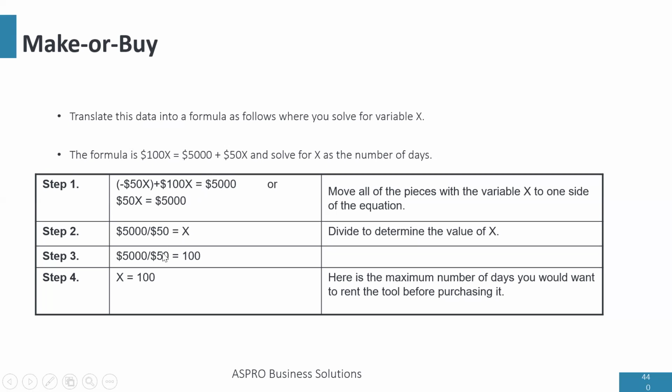So what do you do? If you're going to use this tool for 100 days or more, then you should buy it. If you're going to rent this tool for less than 100 days, maybe 60 days, then just rent it.